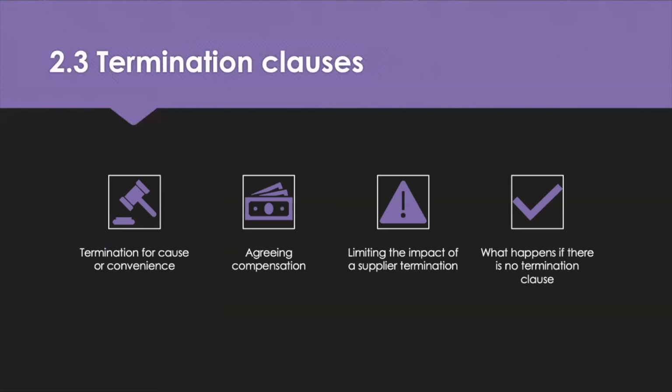So much of the work involved is in minimising risk associated with these large contracts. And a lot of it happens at the contract drafting stage. As well as the conditions and warranties, the contract will usually include a termination clause. All contracts will terminate either through satisfactory fulfilment, mutual agreement, or resulting from a trigger such as a breach of condition. So well-written termination clauses will clearly state possible trigger events, which will save time and money if the contract does come to an end early.